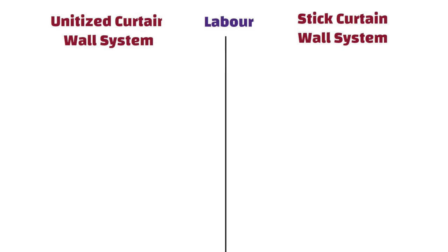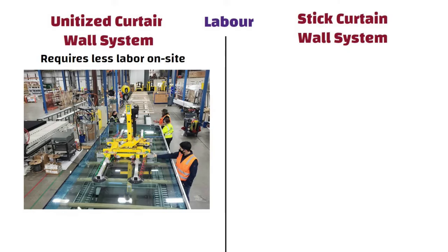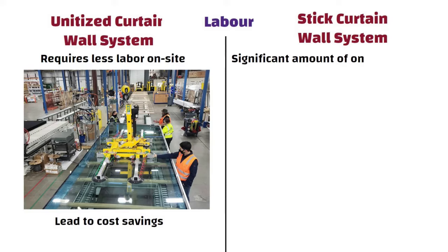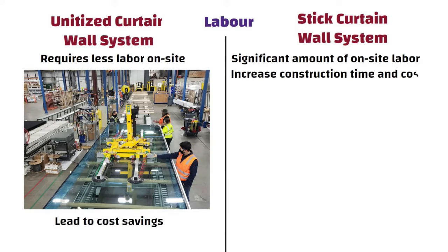Labour: Unitized systems require less labor on site, since most of the assembly is done in the factory, which can lead to cost savings. On the other hand, stick wall systems require a significant amount of on-site labor, which can increase construction time and cost.